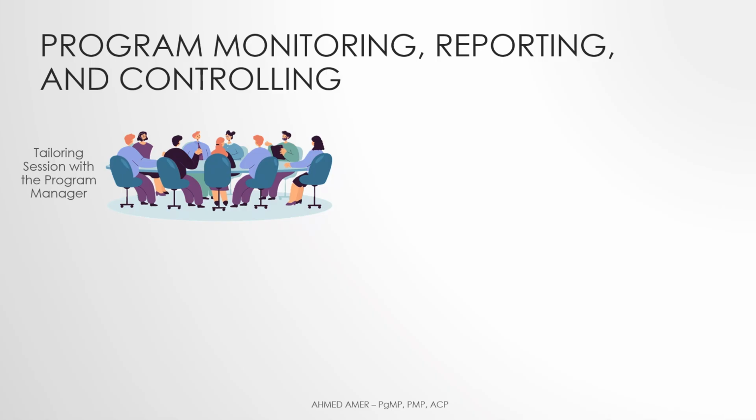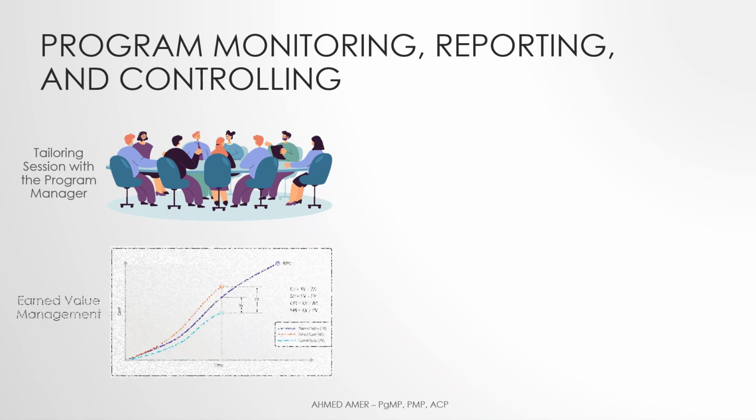We usually find organizations define a set of standardized reporting and controlling processes applicable to all programs. A good example of these standards and controls is earned value management. If you are PMP accredited, then you must be familiar with the earned value set of formulas. These standards and processes are nothing other than the organization's pursuit to monitor programs' progress and status while adhering to organizational controls. The governance board is often responsible for enforcing program compliance with such processes.